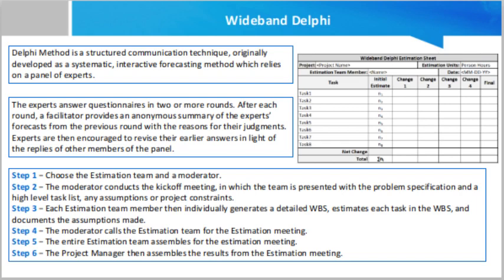Step 5.3 — each team member reads aloud the detailed task list that he or she made, identifying any assumptions made and raising any questions or issues. The task estimates are not disclosed. The individual detailed task lists contribute to a more complete combined task list. Step 5.4 — the team then discusses any doubts or problems they have about the tasks, the assumptions made, and any estimation issues.